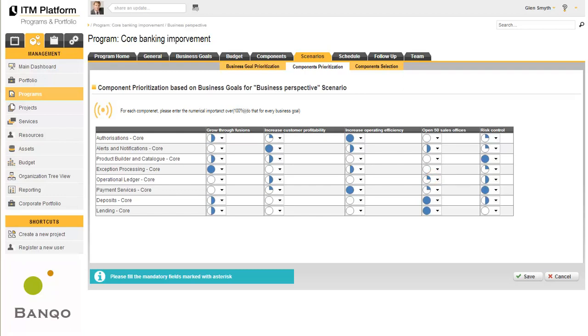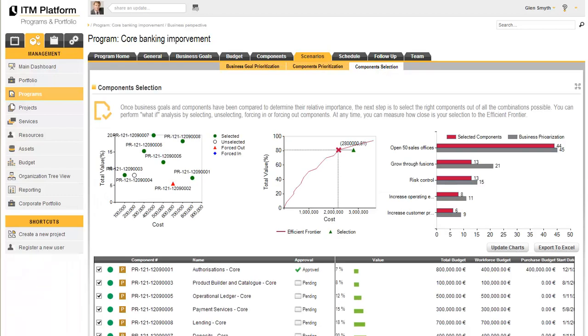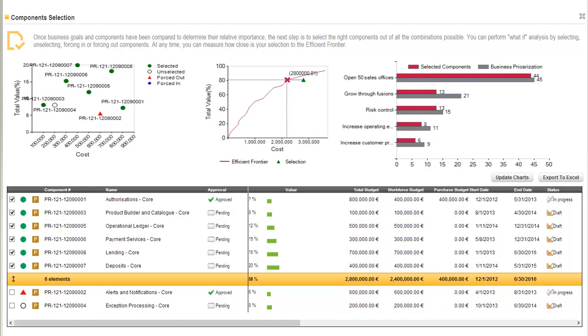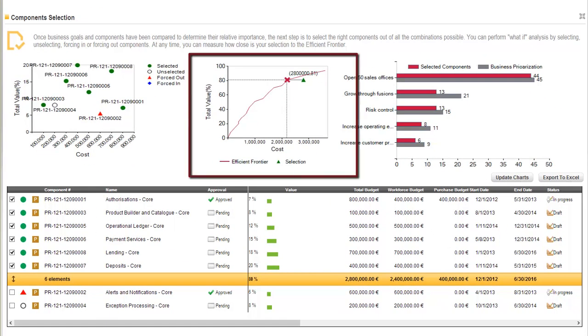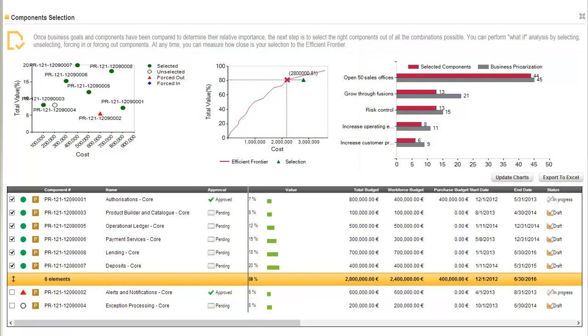As a result, we will be able to decide which project we want to implement based on these ratings. This allows us to see how the proposed project selection stands up against the efficient frontier, in other words, when compared with the optimum cost and value combinations.